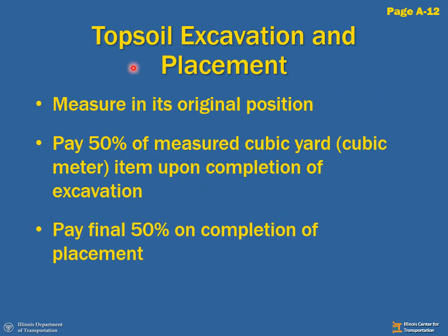Topsoil excavation and placement. This is a unique pay item where it includes both the activity of excavating the topsoil and placing the topsoil. Once we've removed all the topsoil that is required, we're going to measure it in its original position. That means the hole in the ground from where we excavated. And then we're going to pay them 50% of that final quantity in cubic yards.